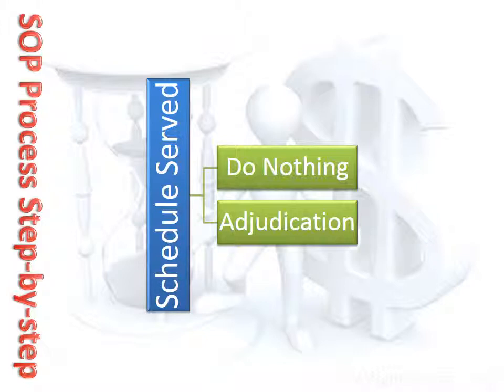If the client does not pay according to the payment schedule, or the contractor does not accept the client's position as stated in the payment schedule, the contractor can apply for adjudication. This is done through a nominating authority. A nominating authority is a body authorised by the government to administer the adjudication process under the Act and to provide qualified adjudicators.